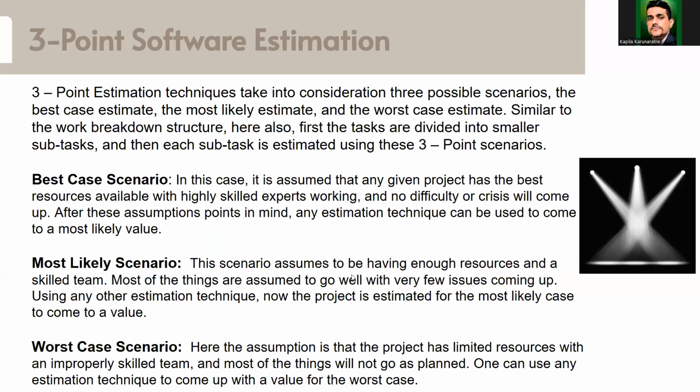The second one is three-point estimation. It's almost like a work breakdown structure, but what we do differently is we estimate for three cases: best case scenario, most likely scenario, and worst case scenario. The best case scenario is when you have a very strong team, where everybody is an expert and skilled, so they can do it very fast.